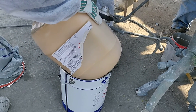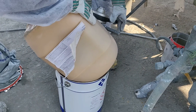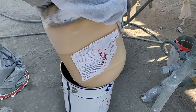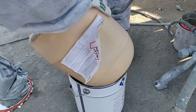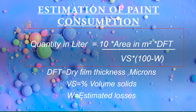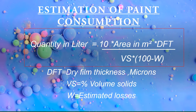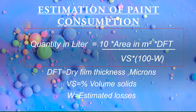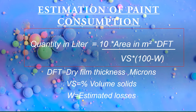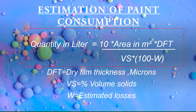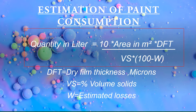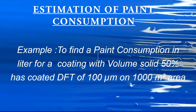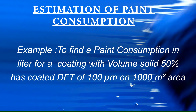Here we are going to estimate the paint consumption. Quantity in liters can be obtained using this equation: Quantity (liters) = 10 × area (m²) × DFT ÷ (volume solid × (100 − estimated losses)).